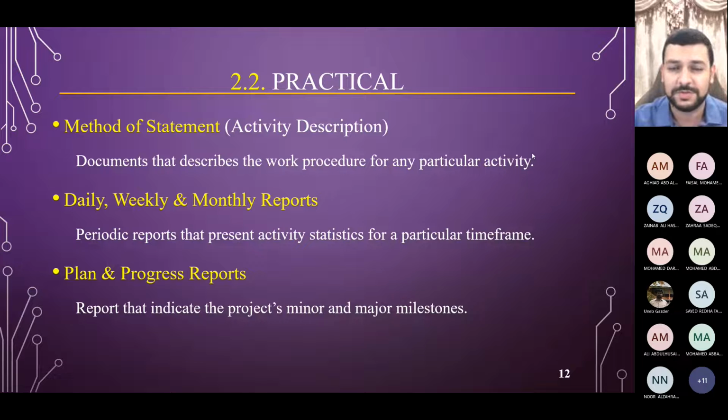Then as engineers, we always have this task, which is giving out daily, weekly, or even monthly reports. Okay, today as an engineer, what were the items that you did? What are your milestones? What are your achievements? Did we finish the task that we were supposed to finish? Is the activity ongoing? Is the activity done? How many people do you have? How many, for example, labor? How many carpenters? How many steel fixers? How many masons? How many electricians? Where are all of those working?